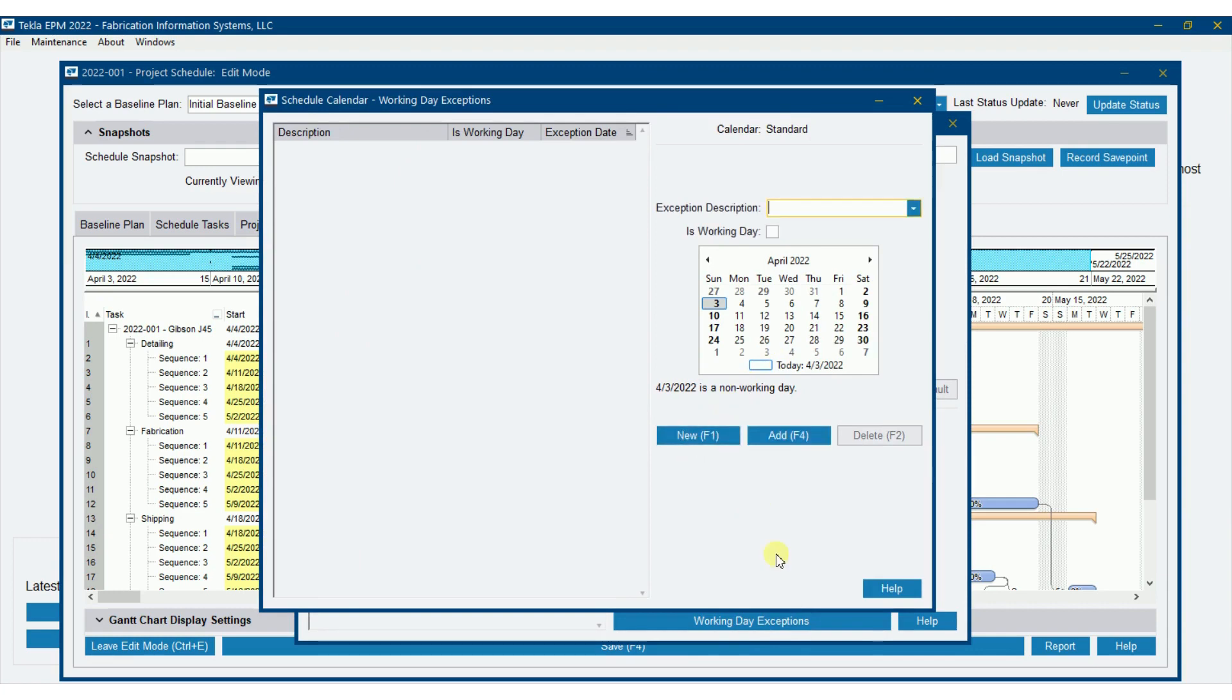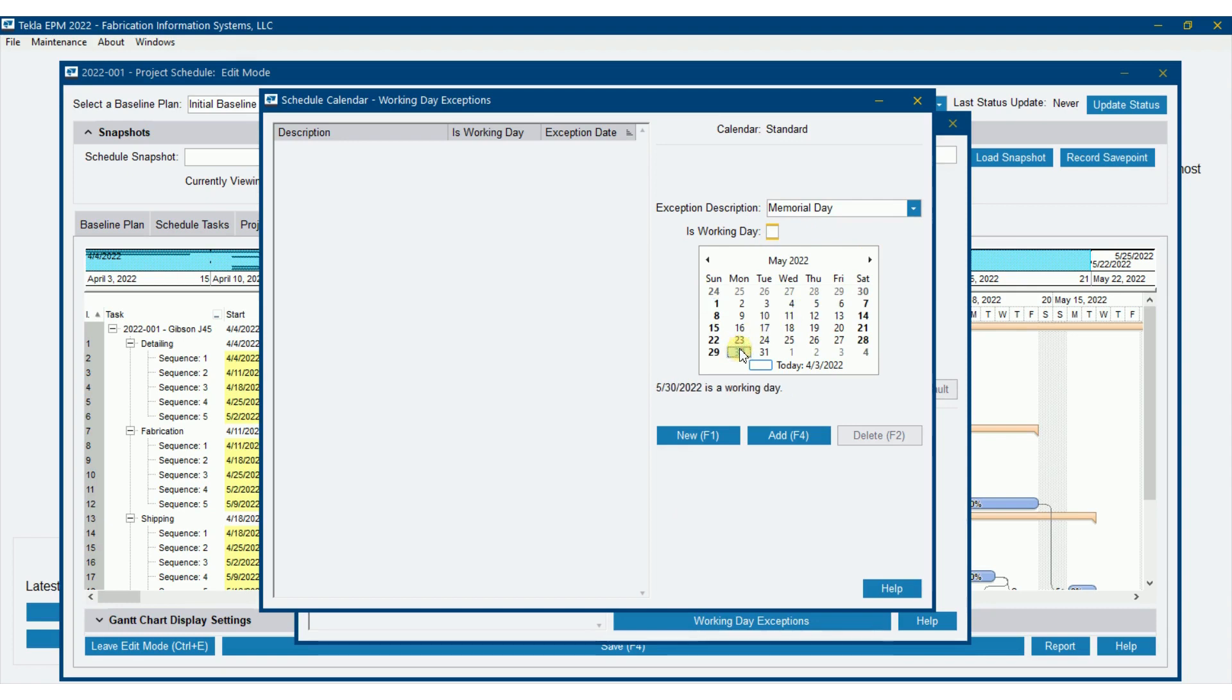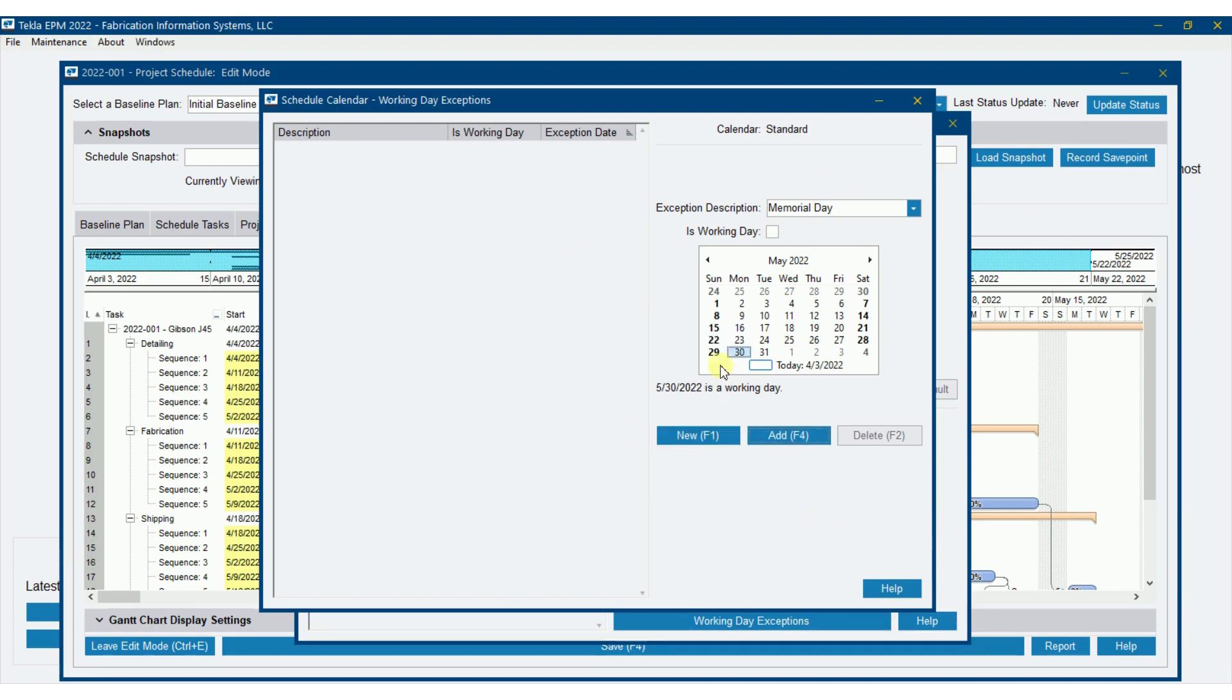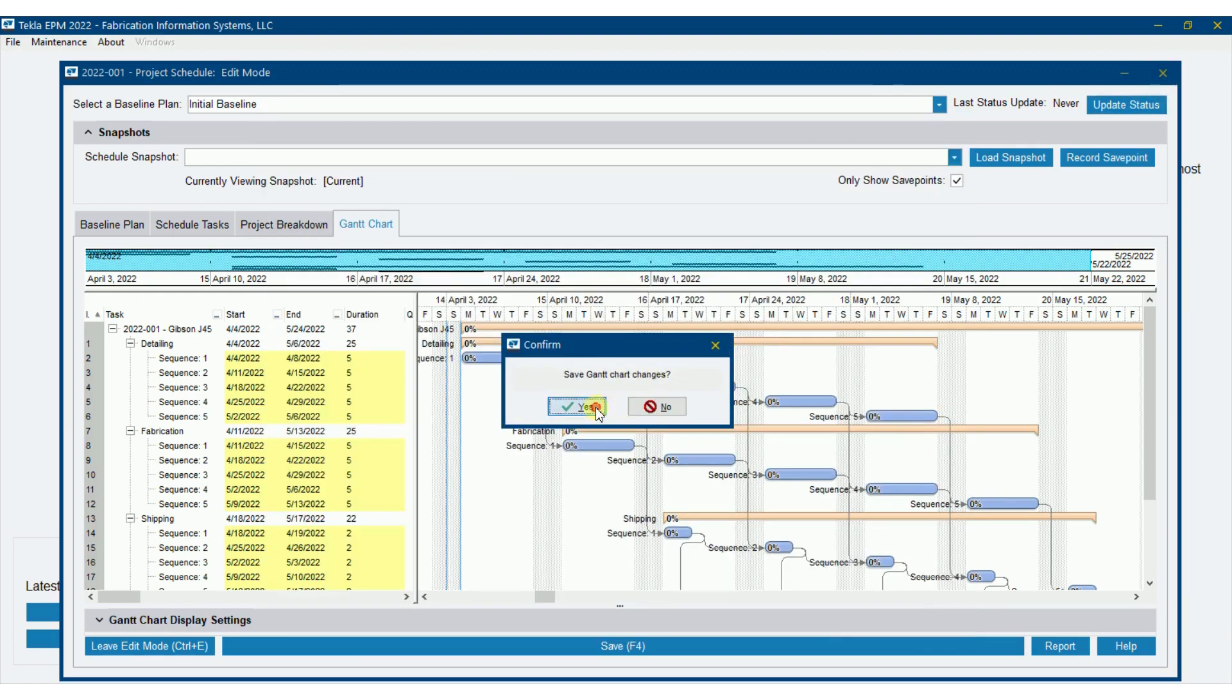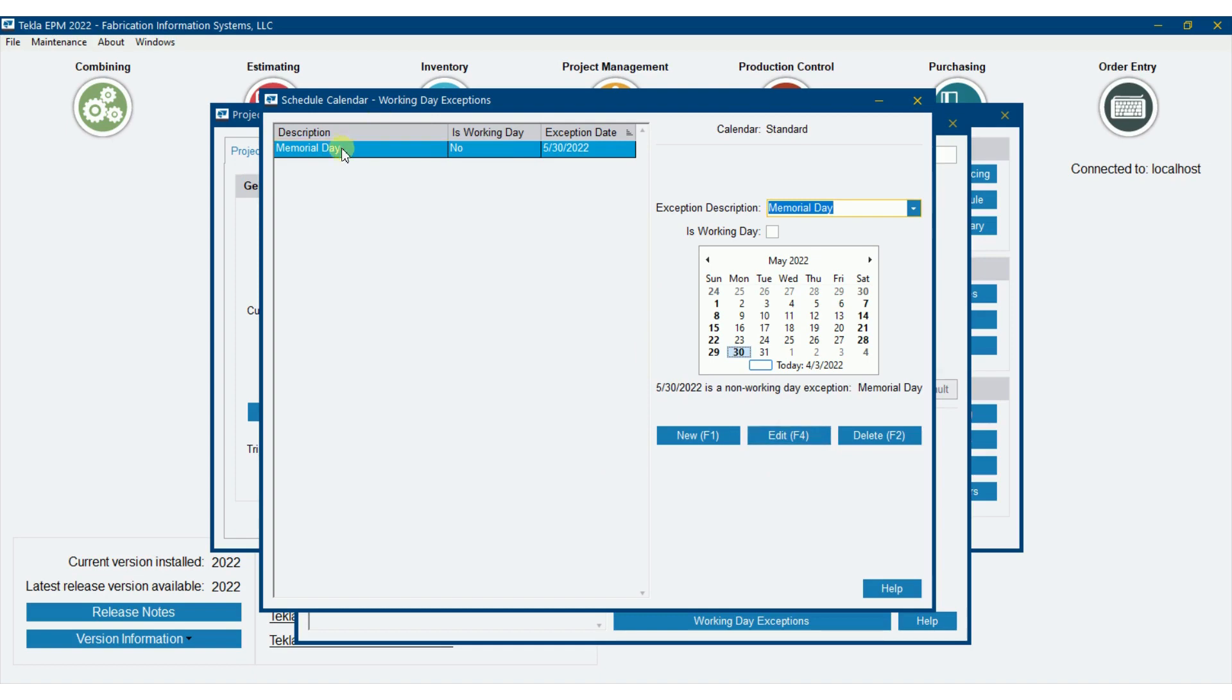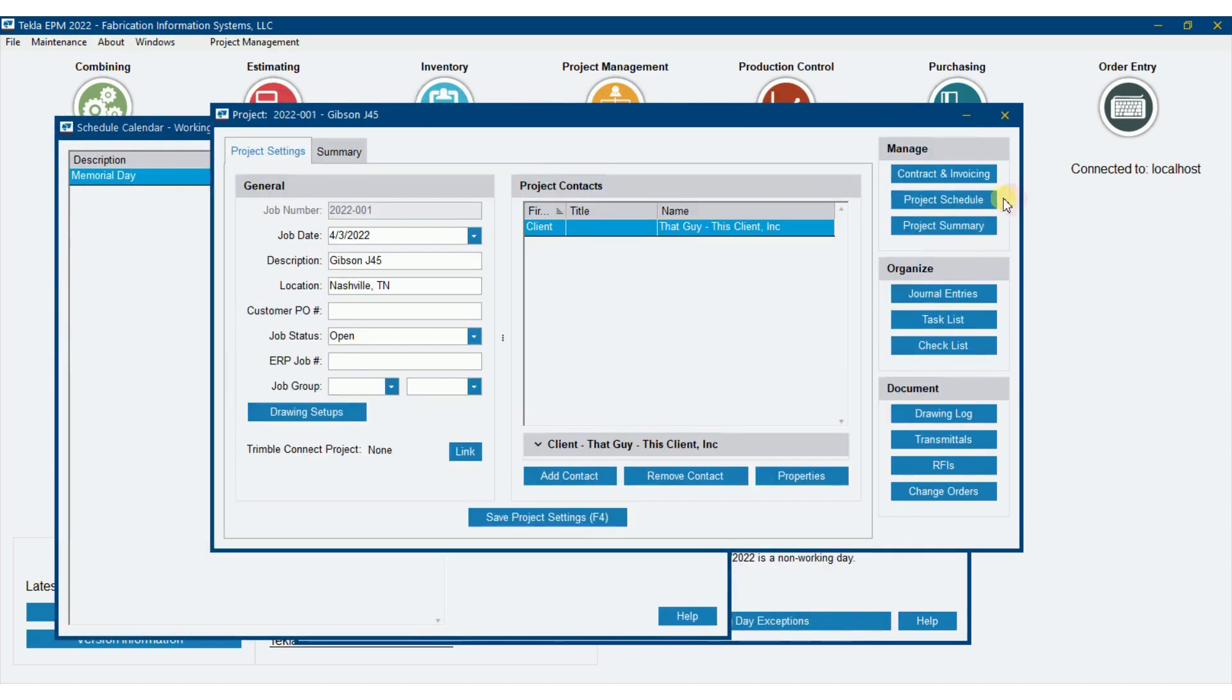Right now, I don't have any set up. But to illustrate, I'm going to go new here and I'm going to say Memorial Day because it is coming up soon. It is not a working day, so I'm leaving that unchecked. I'm going to tag that with May 30th and go add and you'll see it show up over here. Actually, it's going to pop up and tell me that I can't do it because I got my schedule open. So just a little point that if somebody's accessing it, you're not going to be able to. So we'll save that Gantt chart. Now I want to go add, it should pop it over there.